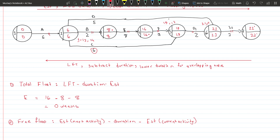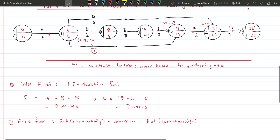Now let's do a non-critical activity — activity C. The LFT for C is nineteen, the duration is six, and the EST is six. So: nineteen minus six minus six equals seven weeks of total float. This means C can sit idle for seven weeks without delaying the whole project. Managers can therefore focus less on C compared to the critical activities.